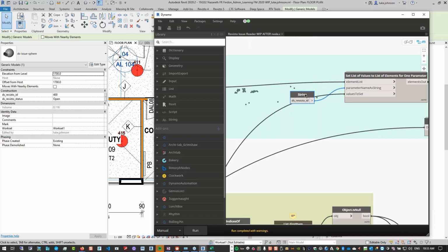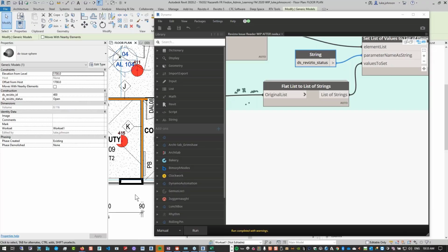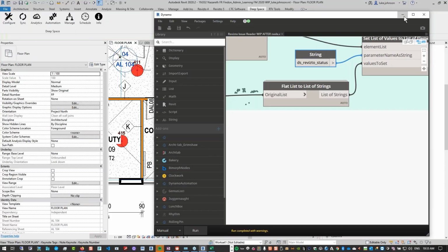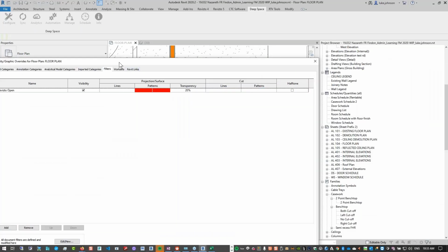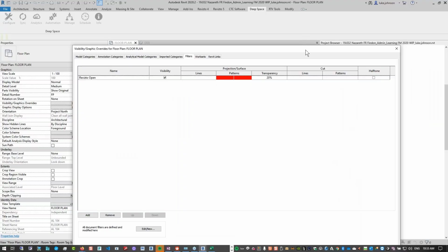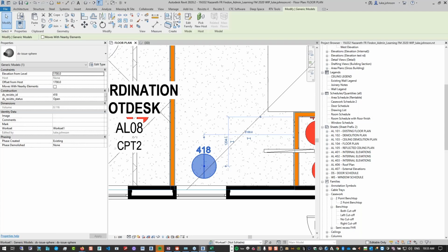We only set 2 parameters in this example. We set the issue ID. So the little number we're seeing on top of the orb is the actual ID of that issue. We also set the status. And so when it's red there, basically it's coloring by status using a Revit filter. And we could set up all of our statuses to colorize these items in Revit. We could do other interesting things like set a hyperlink from here to jump back into Revizto from the orb.